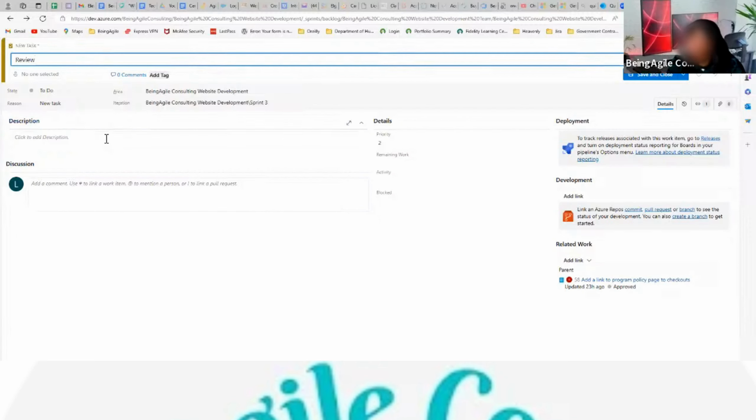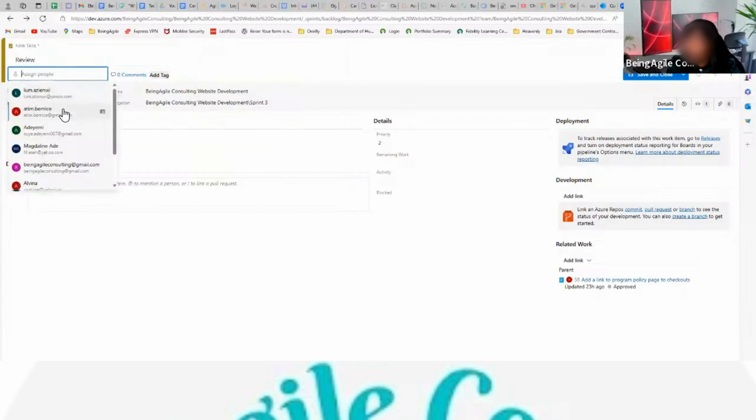say outcome versus output. We don't want our user stories to be output driven. Output would be these tasks that we are creating. Those are outputs because customers don't really get any value from it. But by the time they are done with all these tasks, they're achieving a user story that is usable, valuable, shapeable. But the mistake most organizations or team members make is they create tasks and call them stories. And the tasks don't give any value to the customers when they say they are done with the task.